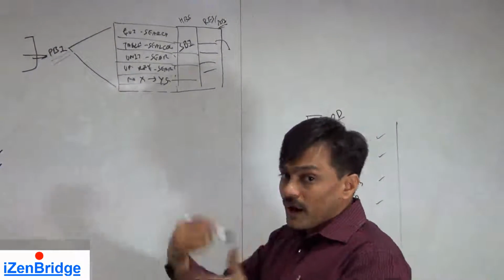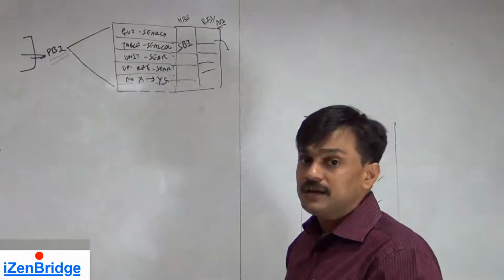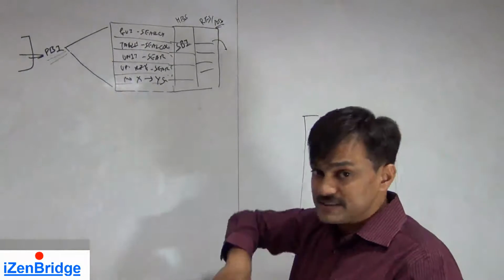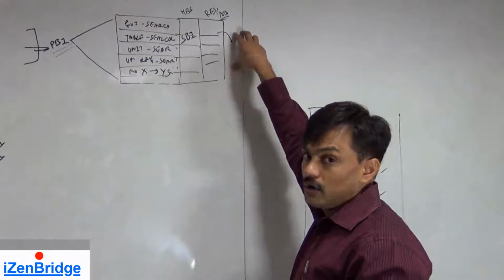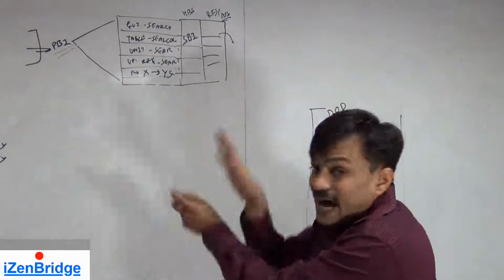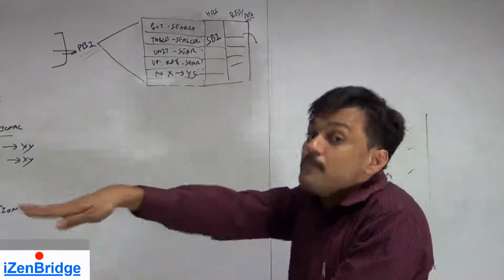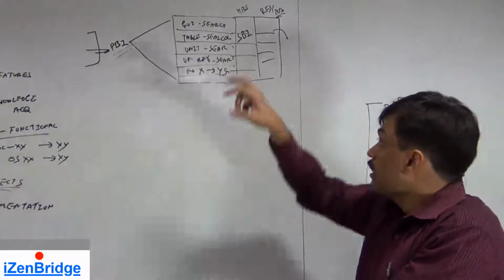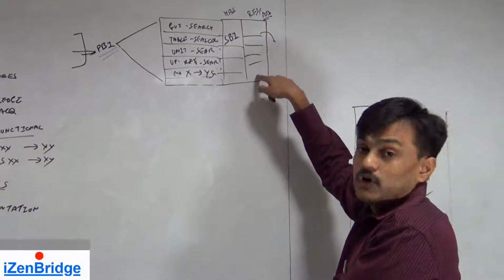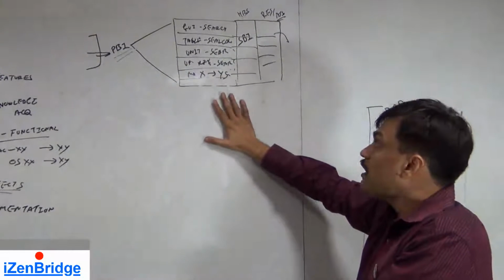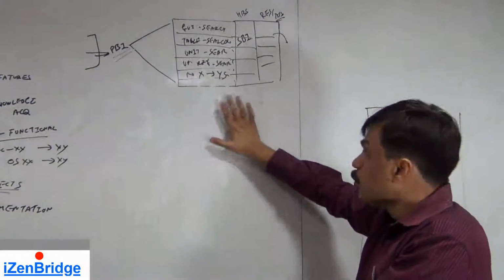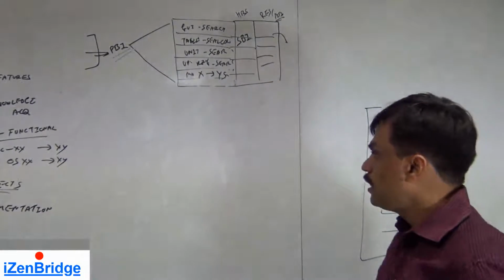And during work after the sprint planning meeting, whenever somebody self-assigns in a daily Scrum meeting, we update the person who is working on a given item. So all the items which are in process will have a name in the assigned column. So if I look at a sprint backlog, I can identify which items are in process and who is working on them.